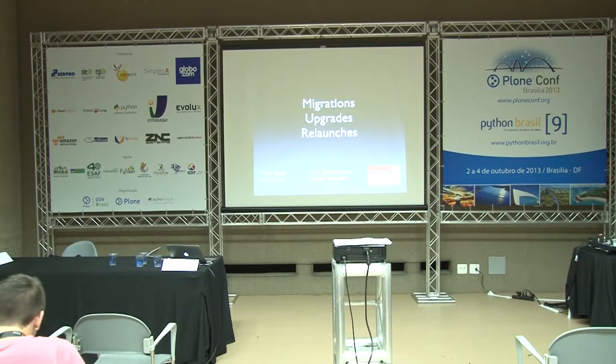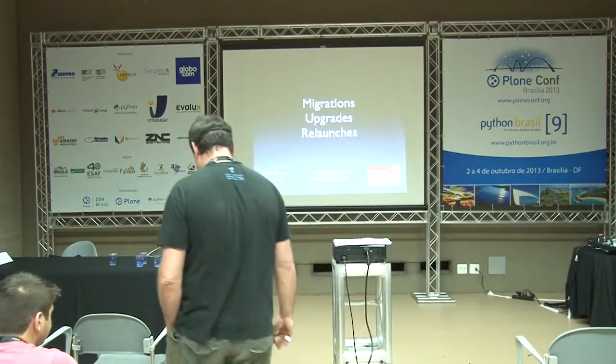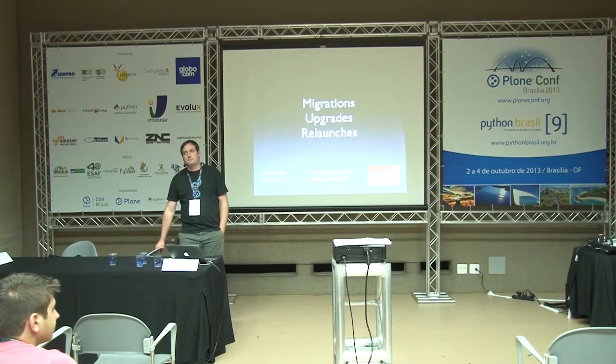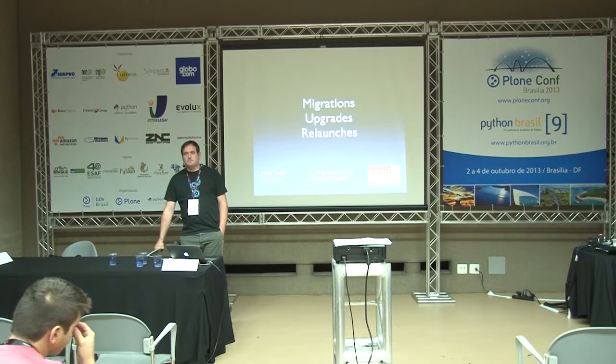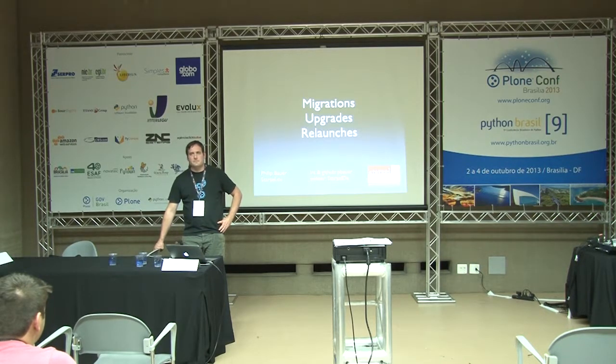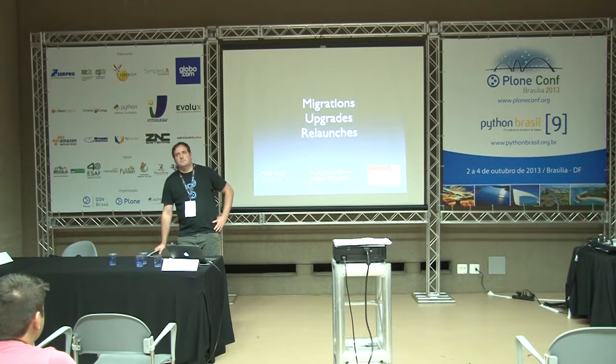I think the main problem with migrations, particularly between major Plone versions, is estimating the work involved. You can't do a small amount of work and then scale that up linearly or using some mathematics to estimate the total amount of work. You really have to do the work before you know how long it's going to take. And the wider variety of content types and functionality you have in the site, such as a more complex intranet, the more edge cases and complexities there are, and it's very hard to predict. I think it's quite a risk offering to upgrade between major Plone versions without a lot of background research and establishing an understanding with the customer that it's not necessarily going to be fixed price work.